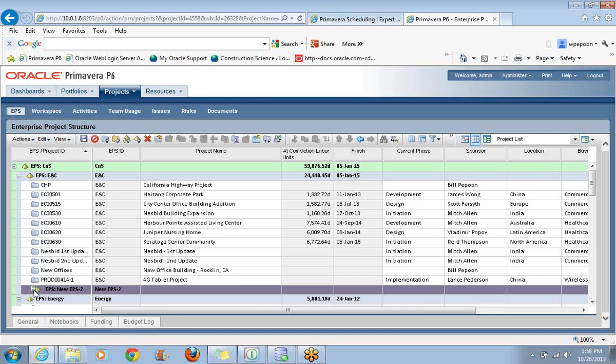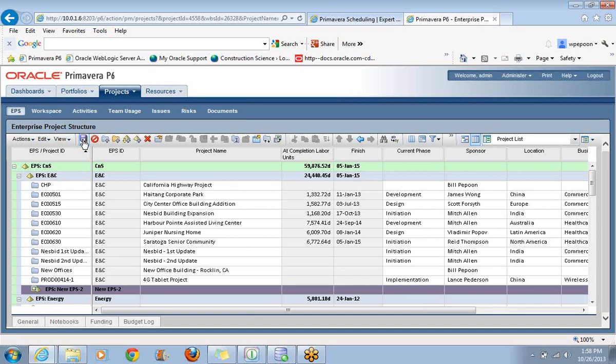This brings us to our very first clue with P6 Web. See the asterisk? Whenever we do something that needs to be saved in P6 Web, we have to save it ourselves. There is no automatic save like with P6 Professional. Think of it as a website. If you were filling out a form on a website and you suddenly closed that window, wouldn't you lose all that data? The green symbol in particular is telling me that something is new.